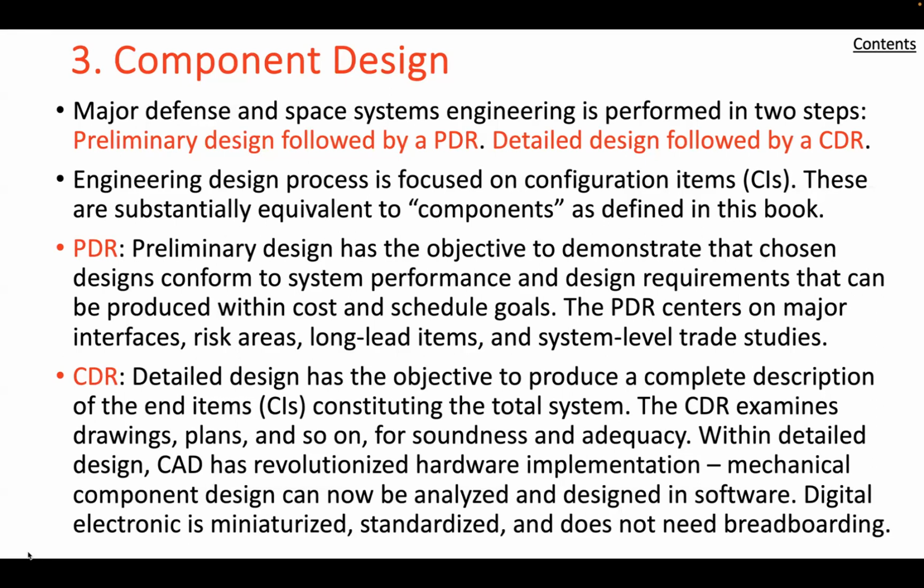Well, let's focus in more detail. Let's first talk about preliminary design. The object of preliminary design is to demonstrate that the chosen system design conforms to system performance and design specifications and can be produced by existing methods within established constraints of cost and schedule. It thereafter provides a framework for the next step, detailed design. The bulk of the functional design effort is properly part of the preliminary design.